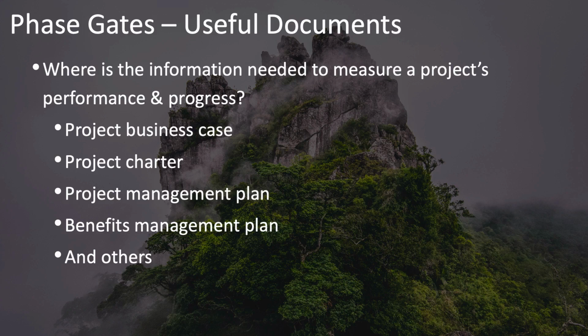The benefits management plan will help you to determine whether the project is still on track to deliver the long-term benefits that are expected from doing this project. And the project charter will help you to see whether or not the project is on track within the original high-level specifications of requirements and tolerances.